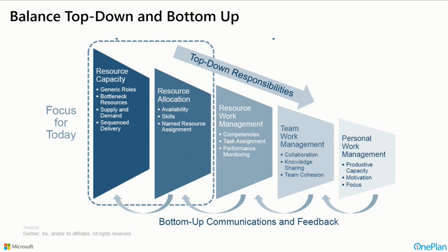Organizations that are starting from very immature or very emerging resource management processes find this is a level of detail that might be good for them to forecast initially to get a sanity check of what the reality is about resources, to make sure in general that we're not over allocating our people. Now, the bottom up might be, all right, now we've got detailed project schedules or work plans, and we're assigning people to specific tasks or work elements, and that information is all rolling up on a time phase basis to give us that resource plan that we have from a very granular perspective.